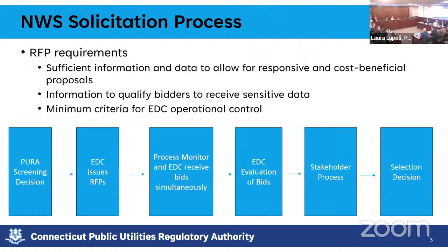So just a very brief comment on my side. Having been on the other side, putting in bids for a couple of years, I'm going to take this example: if the evaluation criteria says that 50% of the weighting is the cost, I'm overstating this. As a bidder, I would try to drive down my cost as far as humanly possible, which everybody's gone through in an RFP process at some point. If that happens, you're stuck with change orders in the end and the process gets more and more expensive. And so that motivates certain behaviors in the bid.